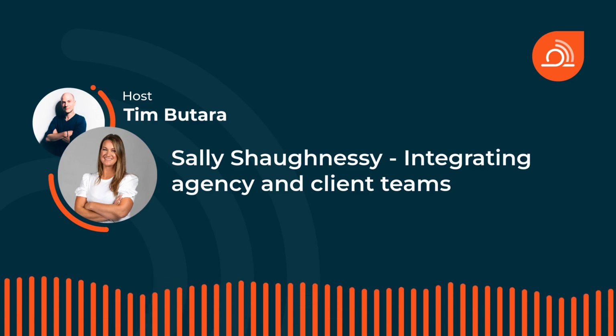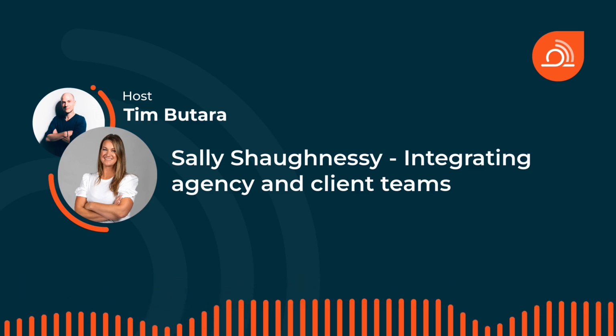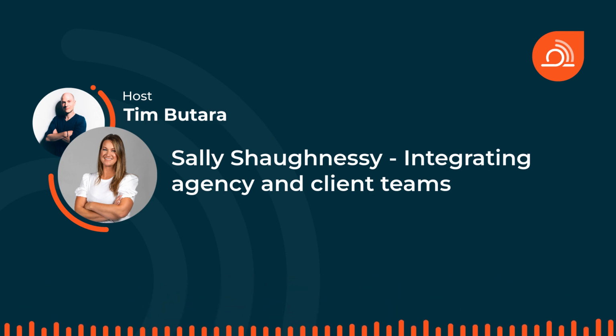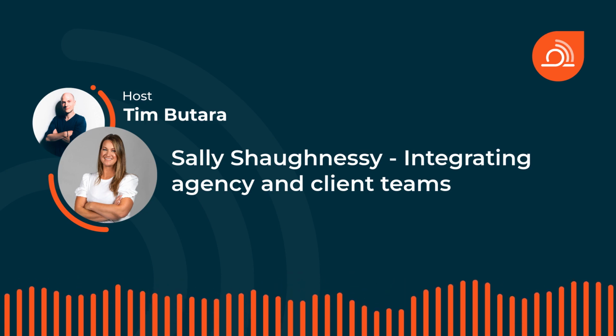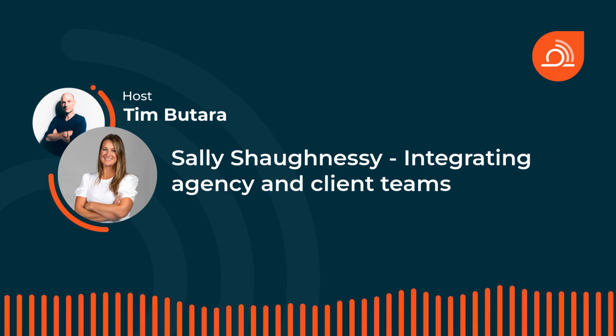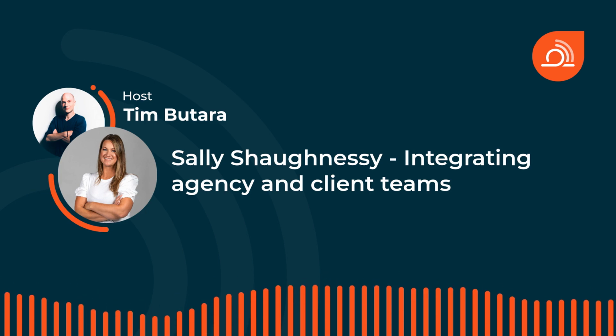If they're an informed stakeholder, what infrastructure do you need to set up so that you can inform those folks? Do you need to have a cadence of press releases or newsletters? Do you need to set up an intranet or a portal or a landing page on your current site so that people feel informed about your project status? When you have these types of engagements, you have identified your stakeholders, you have made a plan to engage them, and then you implement your engagement plan.